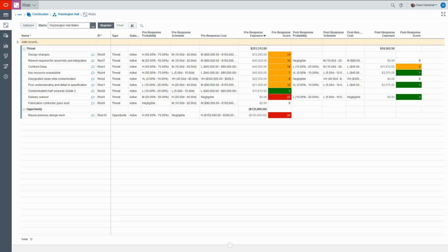Prime also allows us to capture the risks in our project right here in the same place as the schedule. No more need to go to different tools for risks compared to the schedule. Prime's risk register also allows those events which may or may not occur to all be recorded, along with their estimated probabilities and their impact on schedule, cost, and any other project objectives. A risk score is then generated to help prioritize which risks we should focus on.